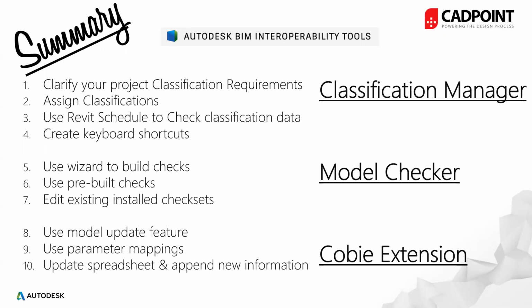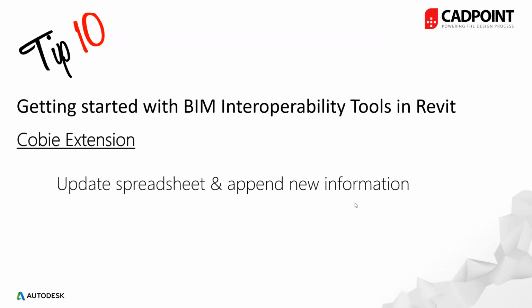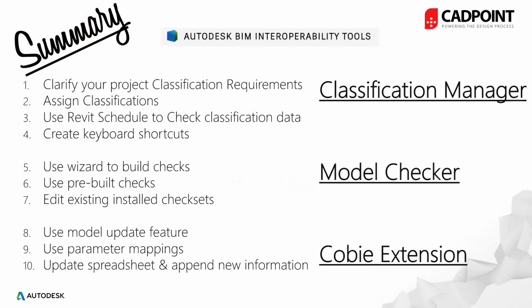If they're using Cobie sheets or some sort of Excel format, because a classification system is an agreed standard, they know by the classification code exactly what something is. So it's a common language that relates to the objects or the information in a model. That's why it's important. You're right, especially when it comes to facilities management at the end. Just passing a project over can be a headache, and having those in place makes it 10 times easier for both parties. Great, thanks for that.